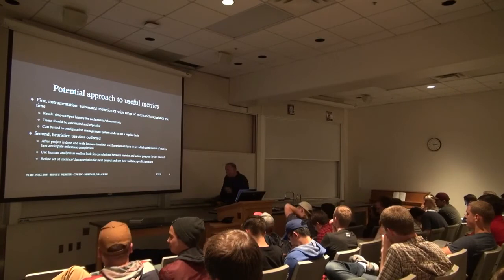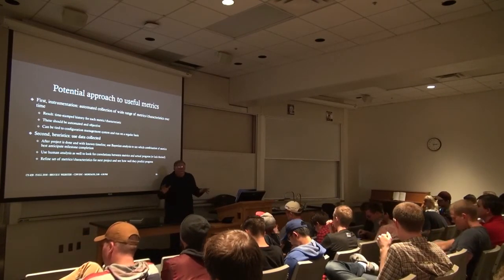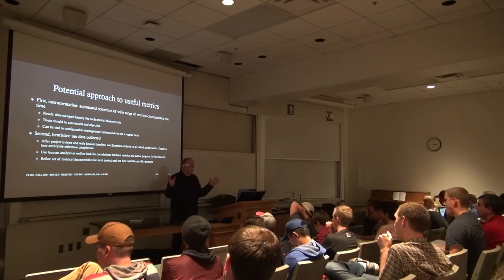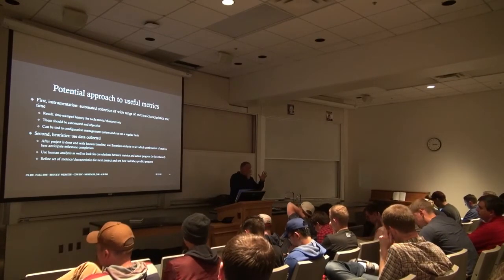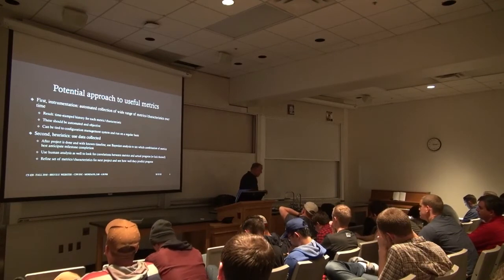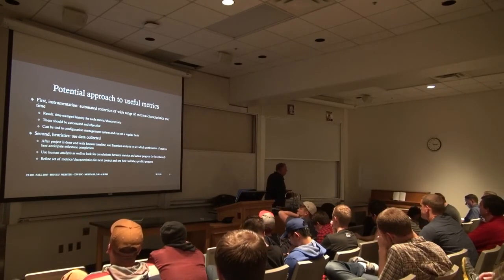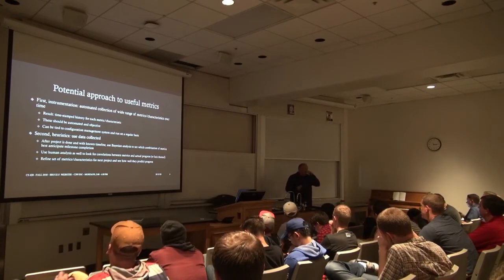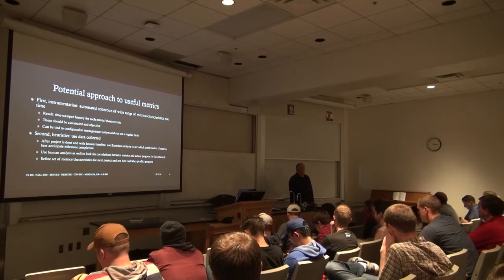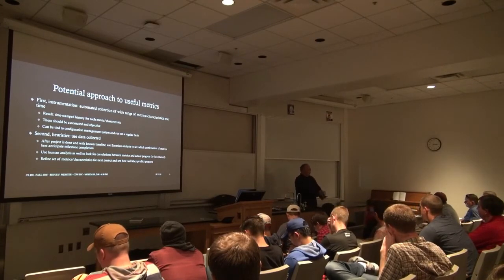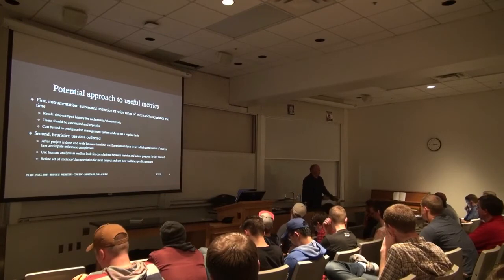I had a case that I worked on as expert witness where there are software estimation models out there. One of the best known ones is COCOMO, actually COCOMO 2, by Barry Boehm and a number of people. It's very complex, and its intent is trying to give you a first order estimate of how much effort is going to be required. Now, I had a case that I worked on as an expert witness where there was an allegation of misappropriation of source code. And the expert on the other side said, well, this is 9,000 lines of source code, and he plugged it into the COCOMO 2 model and said, okay, this 9,000 lines should have taken this long to develop, and with these hourly rates, this is how much the software is worth.